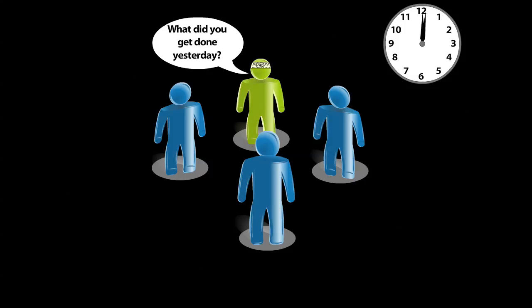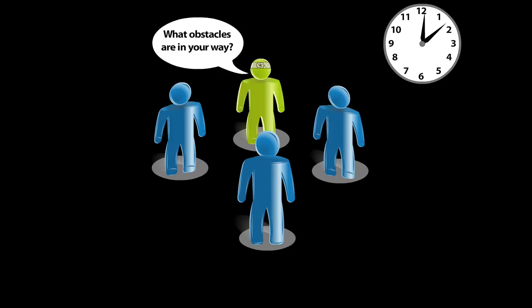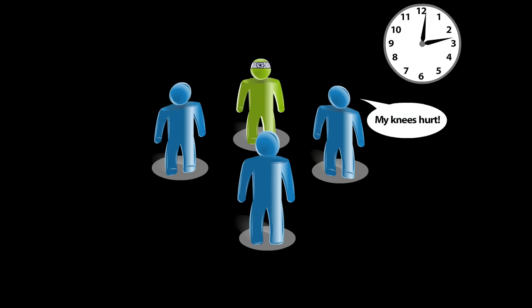And that brings us to this, the daily Scrum. Scrum proponents often insist on short, daily, standing meetings. The idea behind a standing meeting is that if everyone is standing, nobody will waste time and therefore meetings will be short. And by meeting daily, you can feel confident that everyone is on top of their tasks. The daily Scrum is a great idea and especially useful in less experienced teams, but I wouldn't call it a core or essential part of Scrum. Insisting on these meetings in an already efficient and experienced team, especially teams that work in close proximity with one another, could actually backfire by lowering team morale. Keep that in mind when deciding on having daily Scrums.